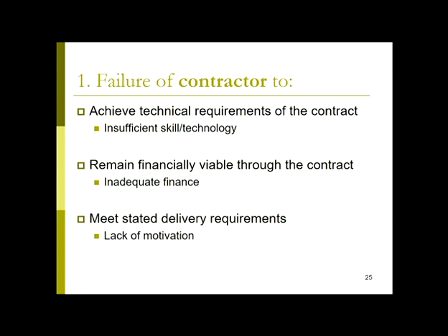So in writing the contract, you would need to put in payment stages along the way. Another aspect is that the contractor should not be carrying debt from other projects, which may mean they may be spending your money on other projects along the way. So that's another aspect of being financially viable.